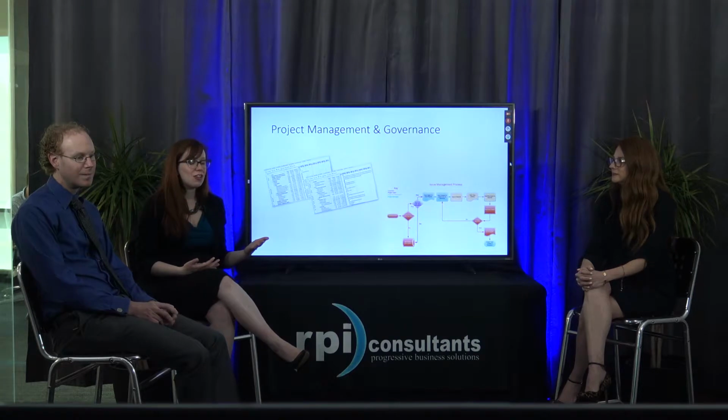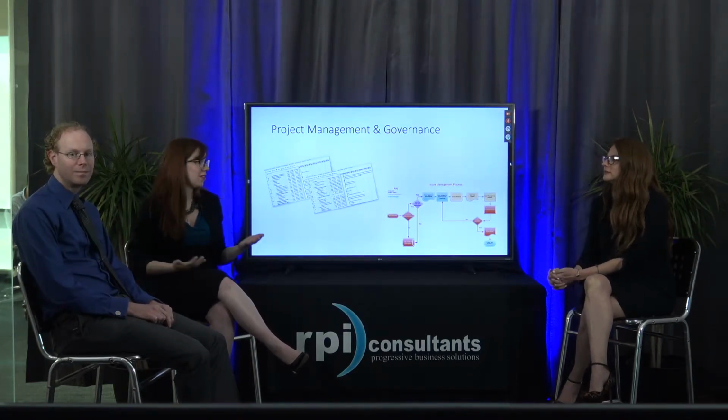showstopper. We also like to do, as we're getting closer to go live, readiness assessments, looking at the team, looking at not just the software itself and the system itself, but also organizationally. Does staff have what they need to use this software? Are people comfortable with any business process changes that may have been made in the design decisions?